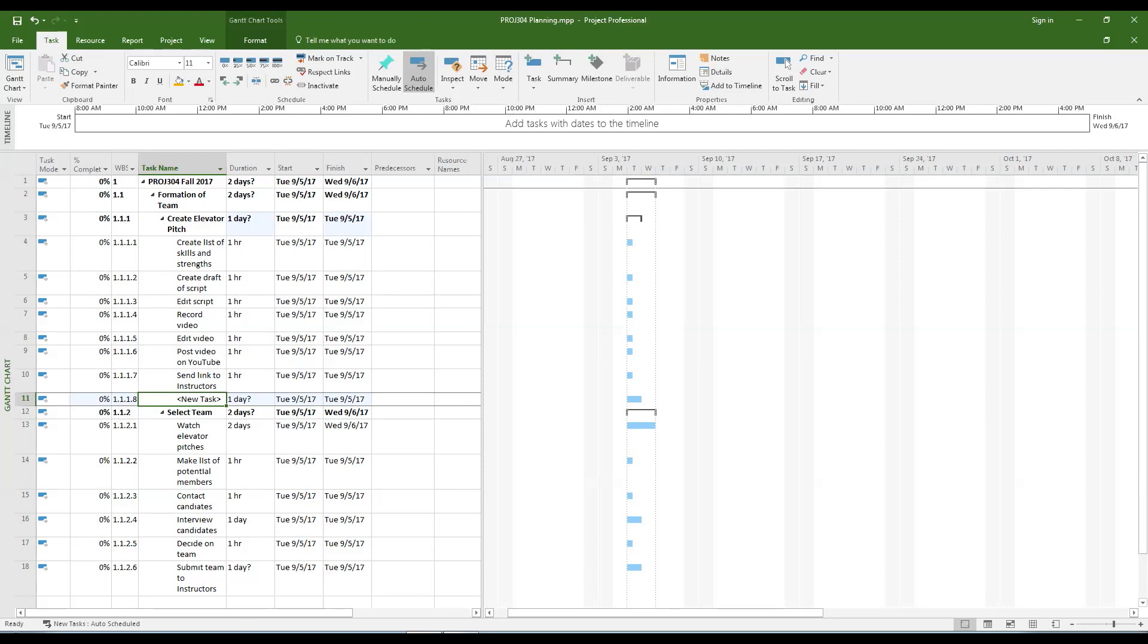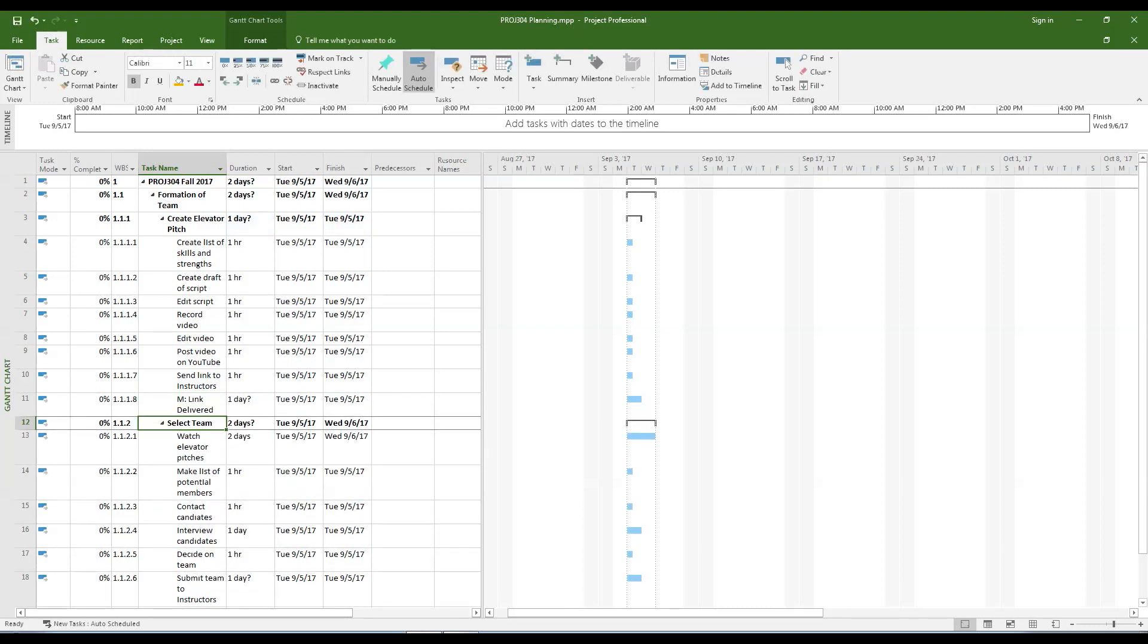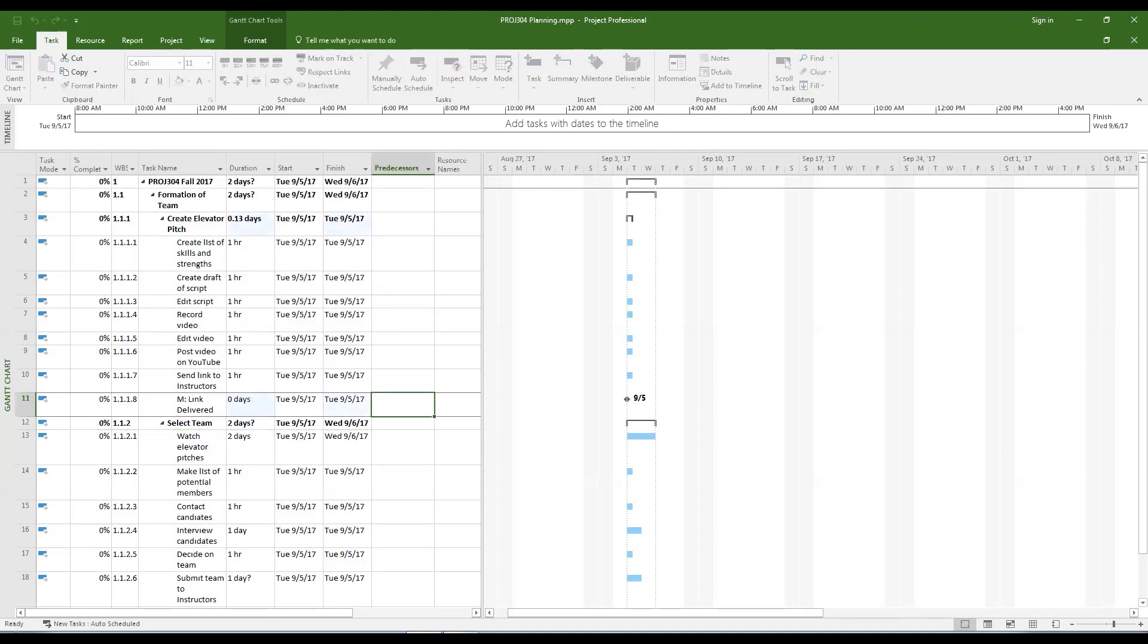Once you have completed entering the subtasks, ask yourself which one will be the last one to be completed for this phase of the project. Look at the number beside the leftmost column. This will be the item number you will use for the dependency of the milestone. Remember that milestones must be identified by using an m-colon in front of the noun followed by the action, and that the duration must be zero.